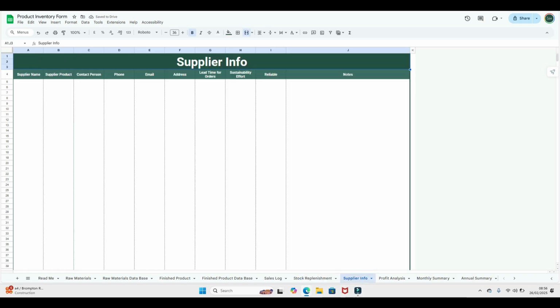Alright, so next is supplier info. This is pretty straightforward here. You just add everything manually. So your supplier name, supplier product, contact person, your phone, your email address, lead time orders. This section is very important because it is important for you to know what the lead time is for each supplier. So for example, if your supplier is Amazon, you can get next day delivery kind of thing. So you can put that in here.